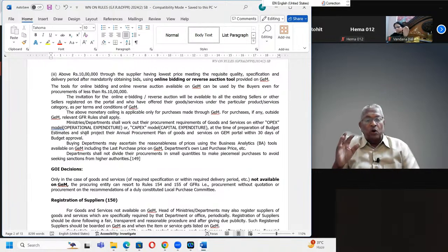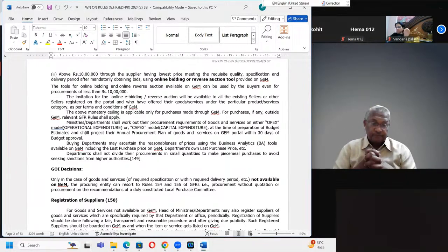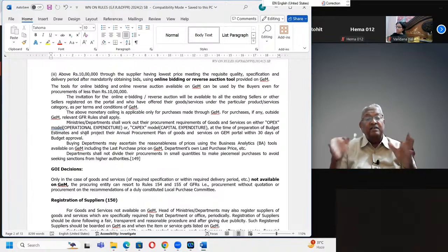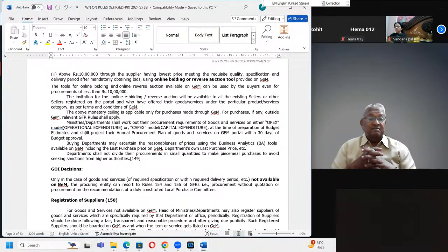So suppose you want 8 photocopiers, what will happen? You will have to approach the ministry. So if you apply to the ministry, they will ask 100 questions. To avoid that, as it would be time consuming, you may purchase one photocopier in the first week of this month, a second photocopier next week, a third photocopier the week after, and the other 3 next month.